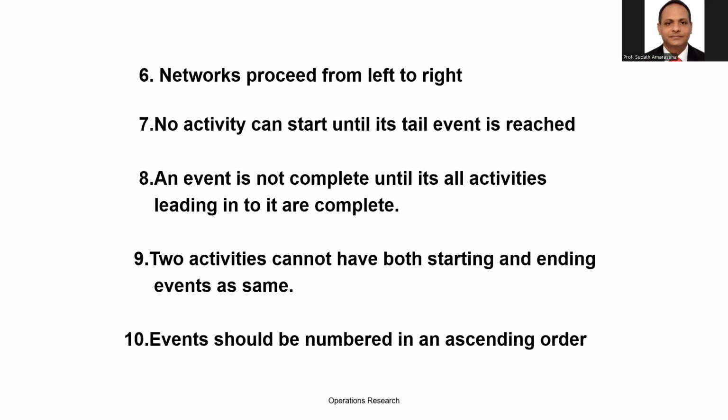We should give a number to each event. If you draw the first circle, put the number 1. If you draw the second circle, put the number 2. Likewise, in ascending order. Okay, now we have already completed the basic rules and regulations.